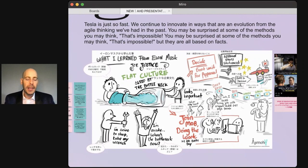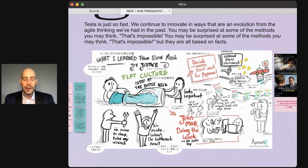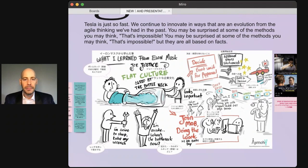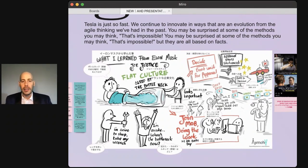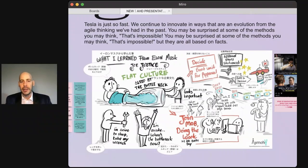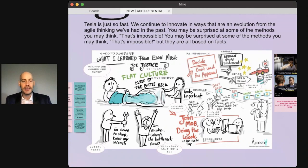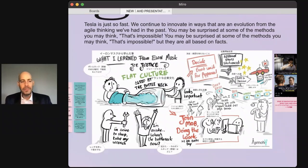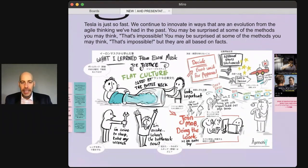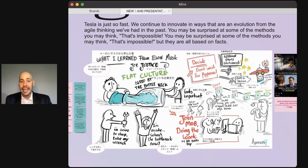They rotate who is the driver as often as the driver feels success. So that depends on the work type. It's usually about every seven minutes, but some work you don't feel success for an hour. Sometimes it's as fast as three minutes. You want the driver to feel success before you rotate. So everyone's going to be driver. If the driver is new, as long as one person in the mob can coach them and give them advice on what to try next, the mob can move forward. At the end of one mob, you've created radical cross training, radical cross skilling.